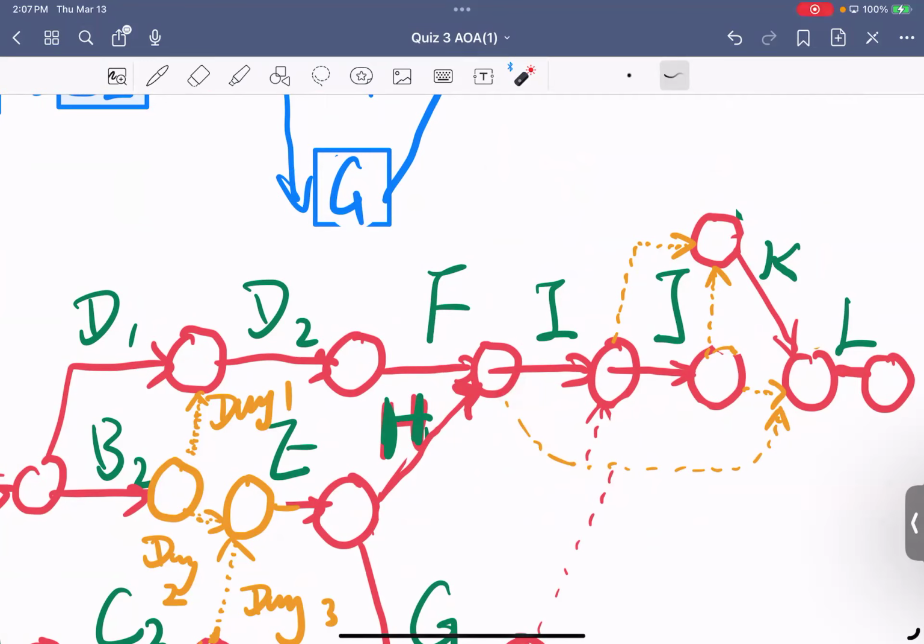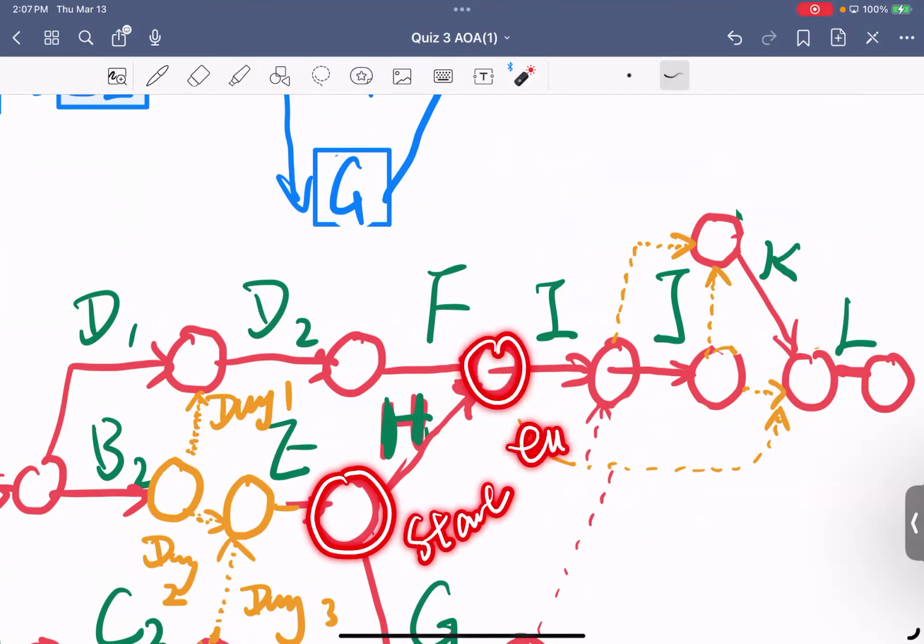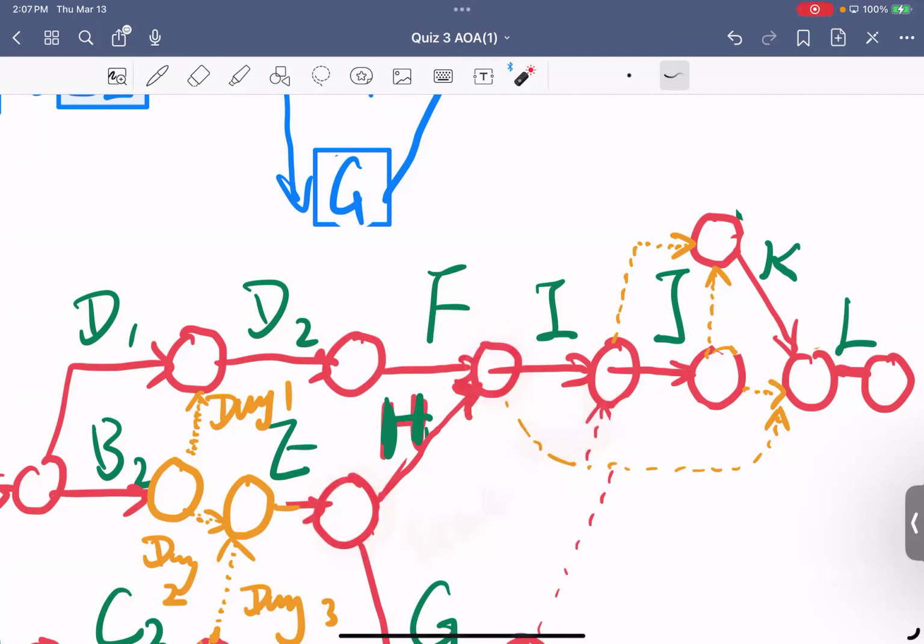I'm not choosing here, right? Why not? This is the start, and this is the finish. So we should choose the finish. This is the start for H and this is the end of H. So the relation is finish to start. Okay?